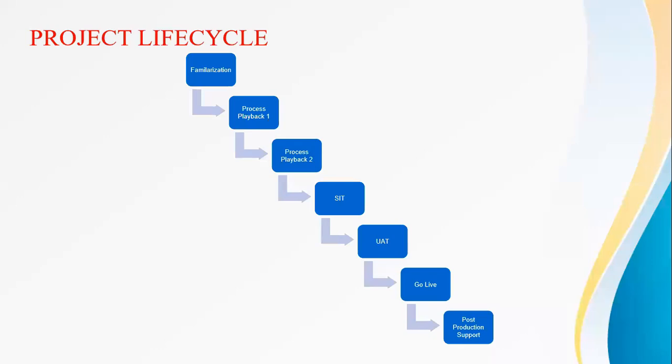So this is how the implementation project life cycle is. It starts off with familiarization. You have the process playback one, playback two, SIT, system integration testing, user acceptance testing, go live, and post production support.